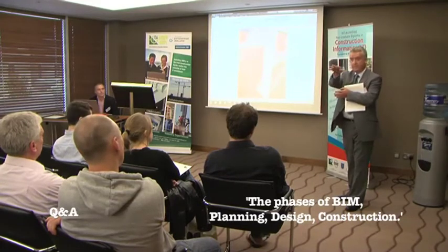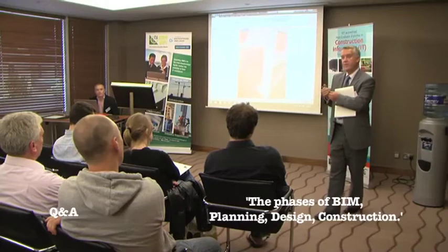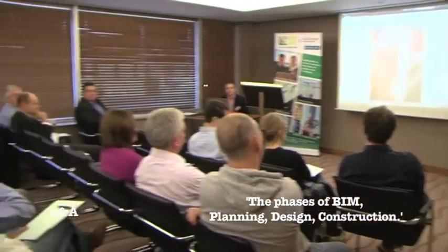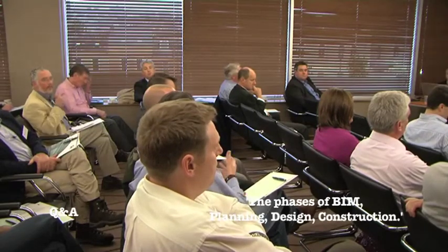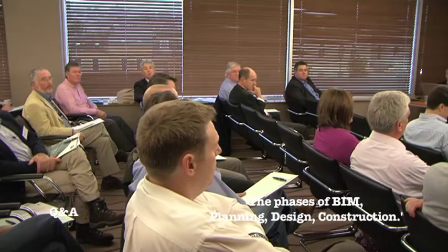Trevor, you've another quantity surveyor you've just worked on with the CITA BIM workshop. We're looking at Revit and QTO, and what we're hoping to do on that is produce stage 1 and stage 2A cost plans. KSN, the surveyors on the project, I'm acting as a consultant to them, reckon that to produce a stage 2A cost plan on an A-class classroom school will take around 2 weeks between pulling information from all sources. We're hoping that we'll produce it in significantly less than 2 days. And we're going to use Revit, extract the information into an Access database, crunch it in Access and throw it into Excel, into the Department of Education's template.